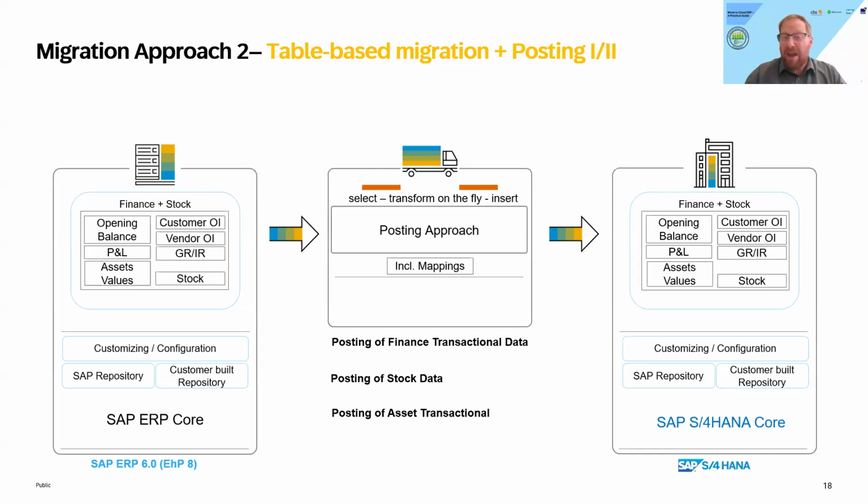And also specifically in wave-based situations, if we're thinking about situations where it's not multiple systems being consolidated, but maybe a single global instance being spread across multiple waves, because let's say the customer is fearing the change management needed for a Big Bang approach here. Of course, it means that the system goes over in waves, and typically you would use company code clusters or regions basically to move over.